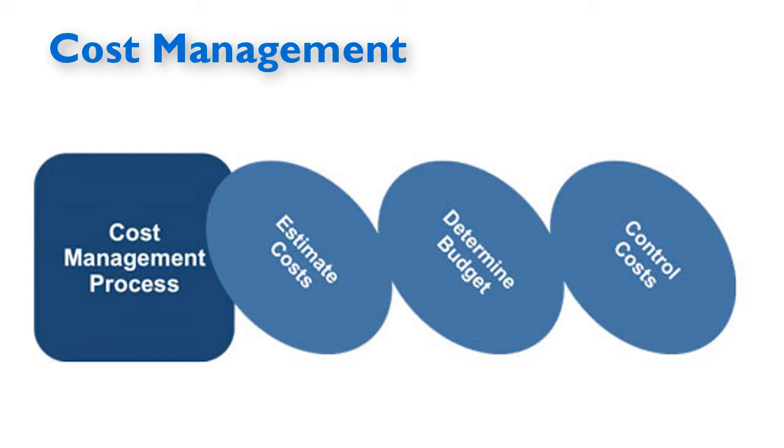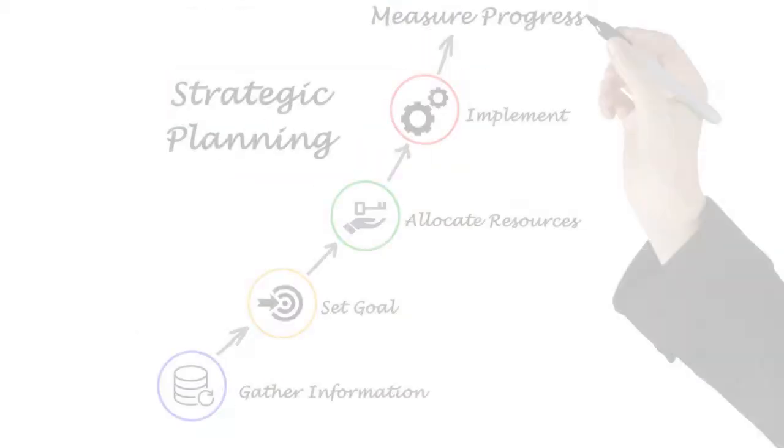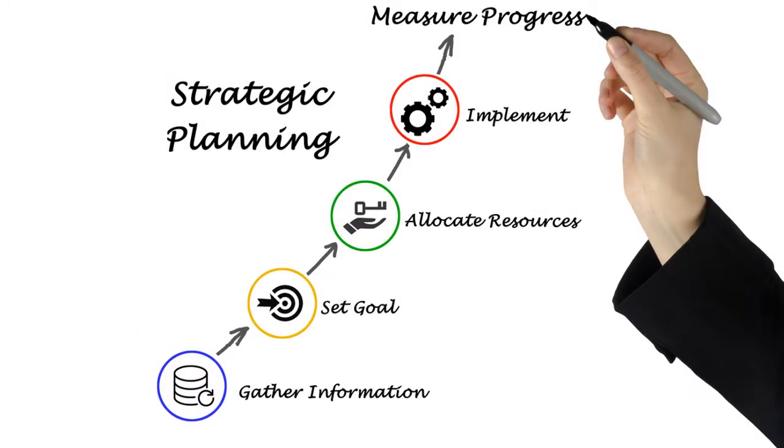It is also important to foresee a crisis budget in case some costs cannot be evaluated precisely or in case of unexpected circumstances. Project plan can be completely developed when device requirements are clearly defined and set, and until then a more downgraded plan needs to be in use that in the end matches the final plan or even significantly deviates from it. During many iterations of requirements definition, we can see a journey on how to achieve the final goal and successfully finish the project more or less clearly through every repetition.